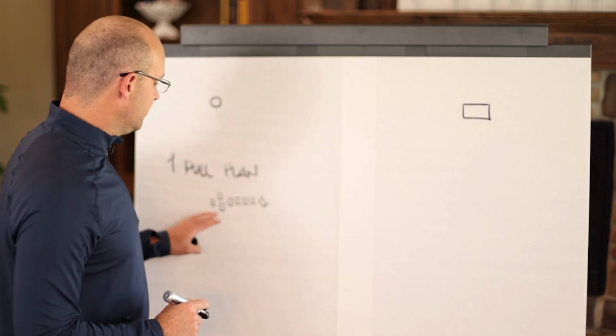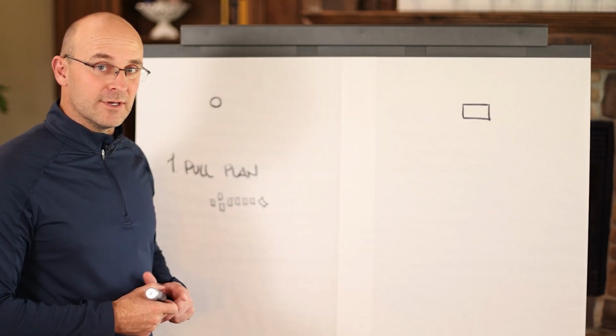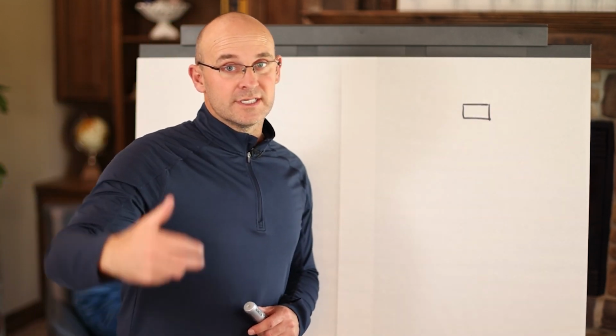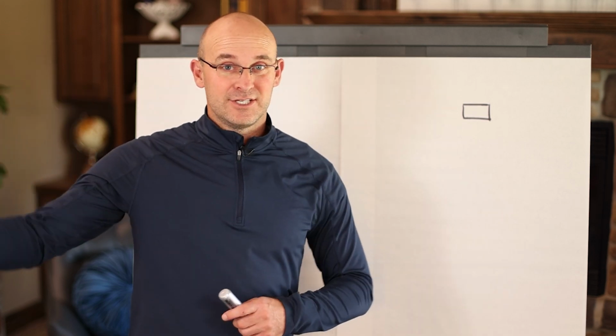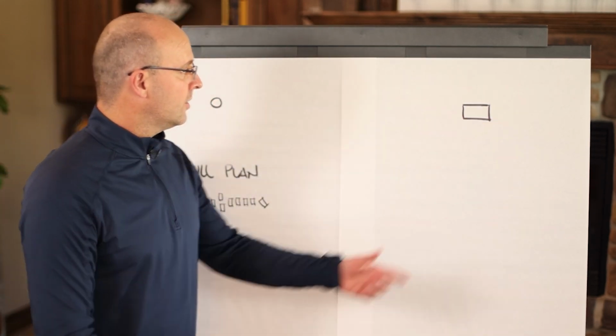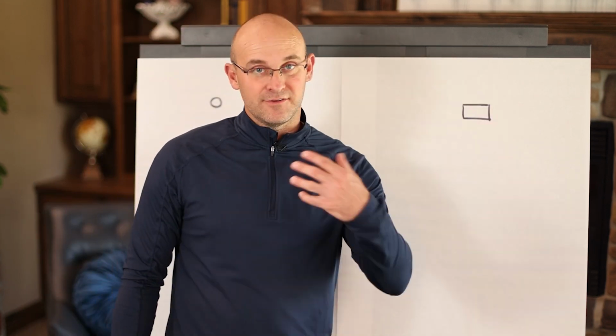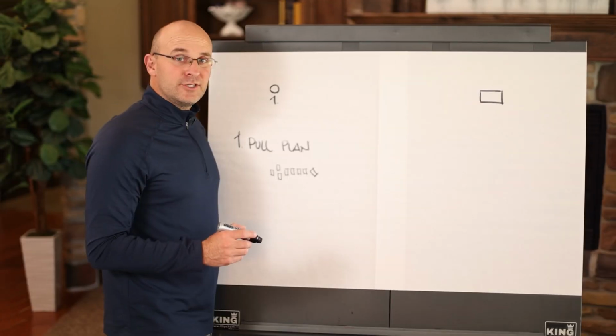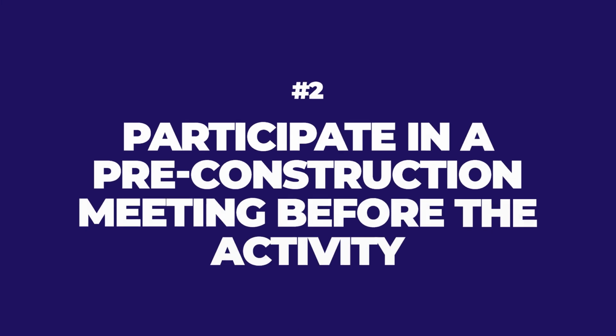But the point here is you will create a collaborative sequence with your project team, with the other crew leaders and the general contractor, so that before you ever even get to the work, you know exactly where that activity fits in the sequence. Number 2, participate in a pre-construction meeting before the activity.